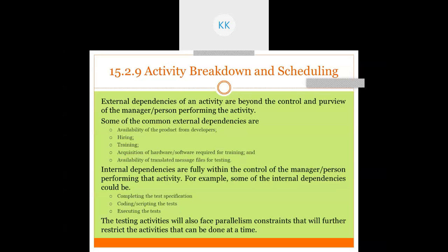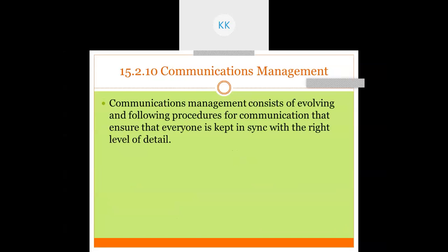And second is internal dependencies: completing the test specification, then coding, scripting the test, then executing the test. These are the internal dependencies.